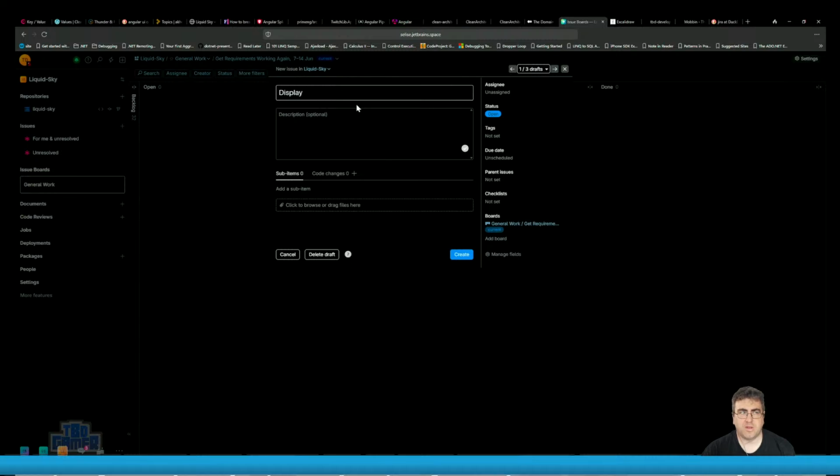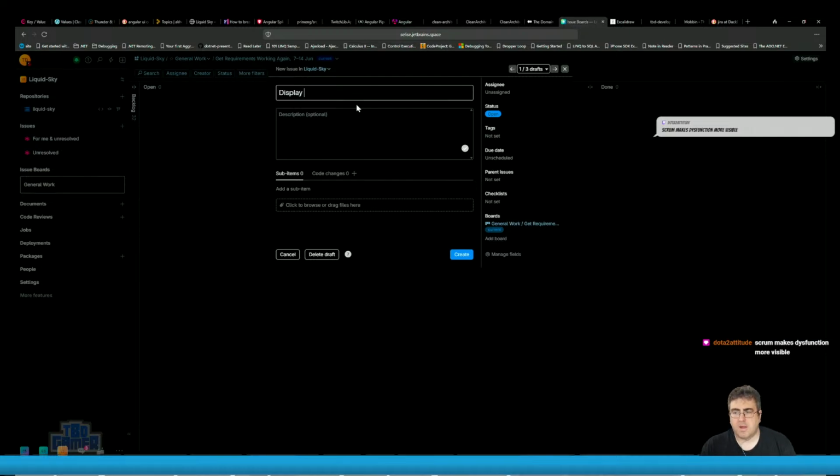So that's why Scrum kind of works, in that it allows for accountability in so much as the team agrees to take a certain amount of points. If the business or the group feels that they're not challenging enough, they're not pushing hard enough to progress, then that's allowed for, right? You can push back and say, well, are you being a little bit easy on yourselves, right? Are you being too quick? Yeah, it does make dysfunction more visible because you can see the cheats.